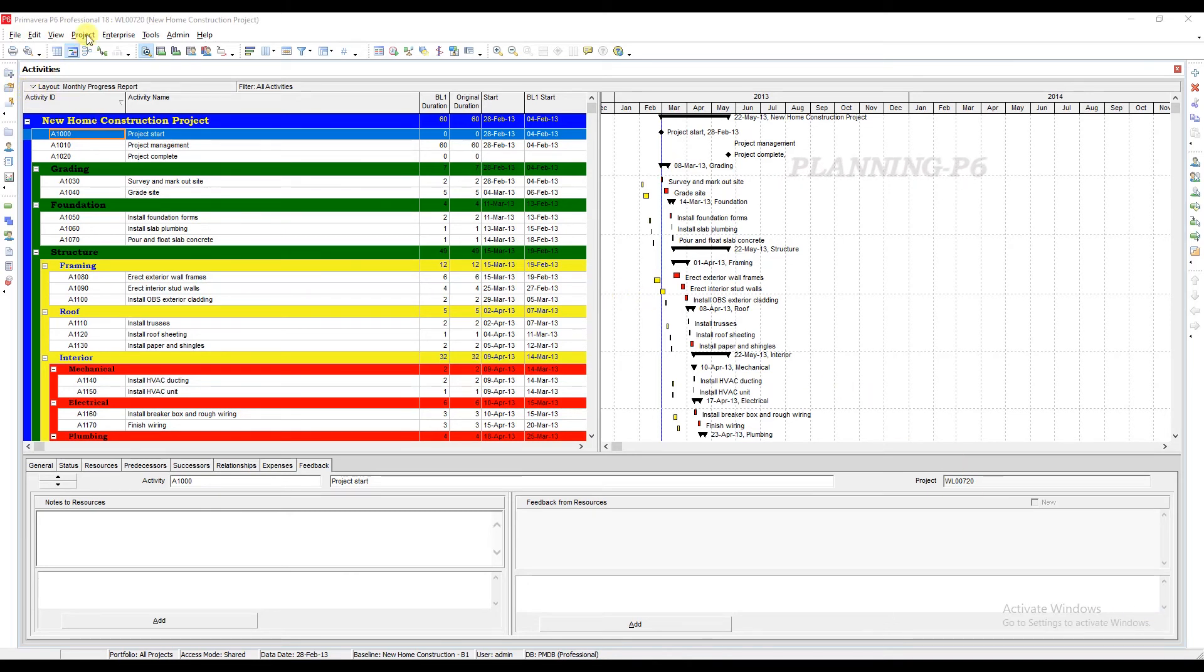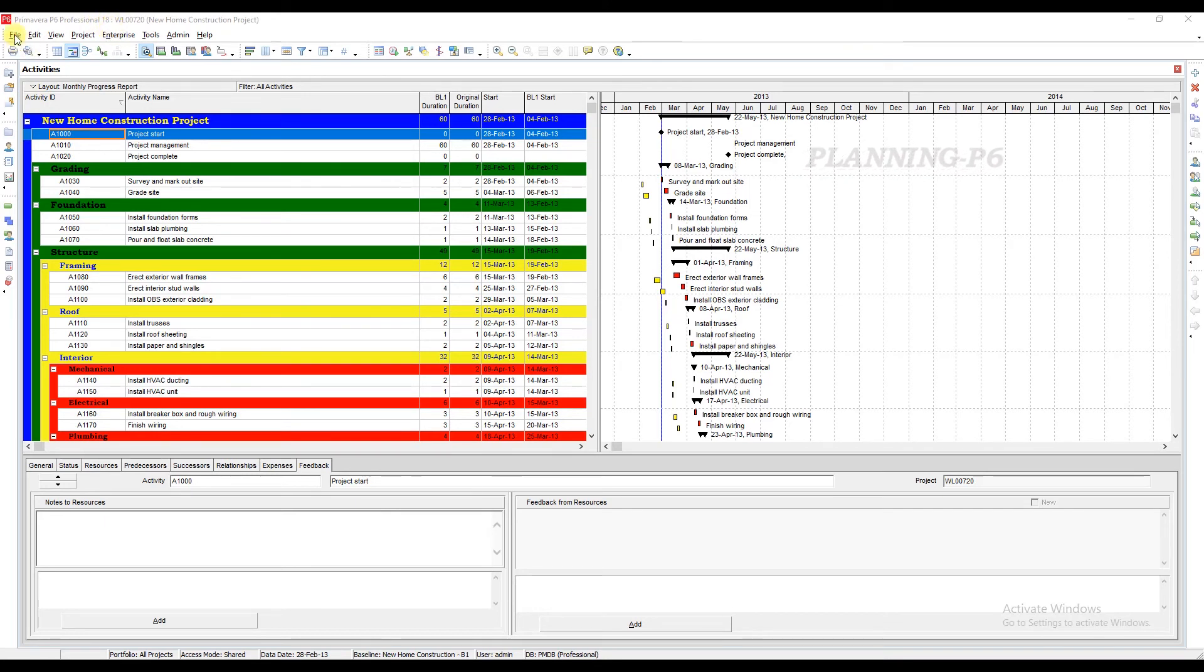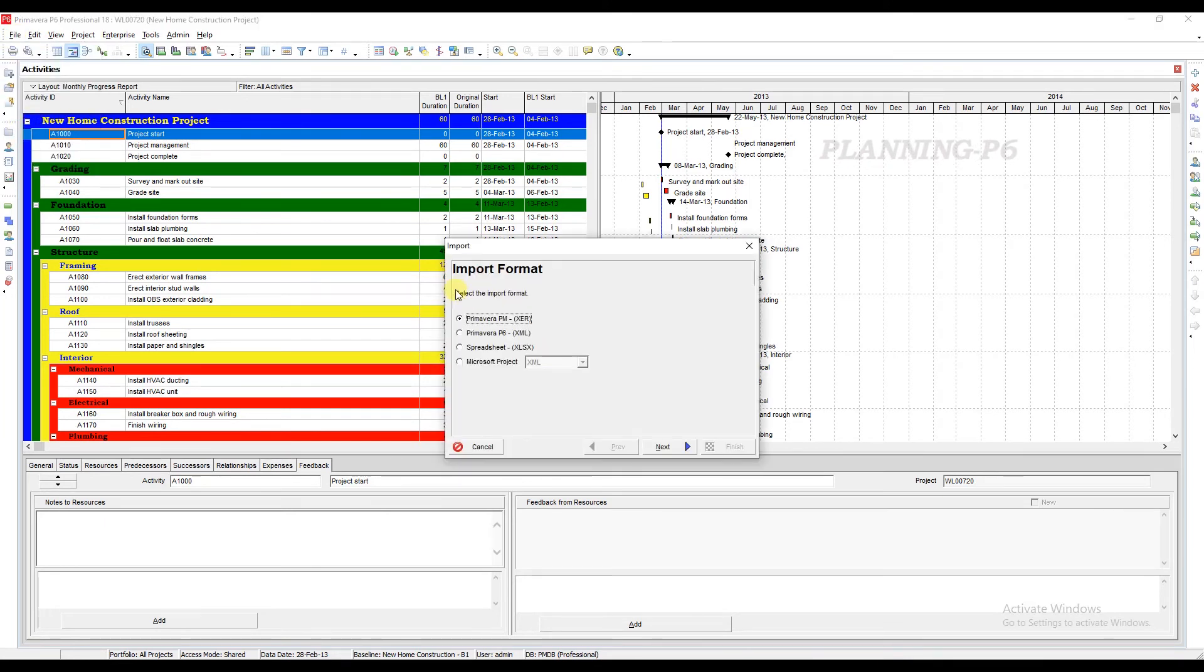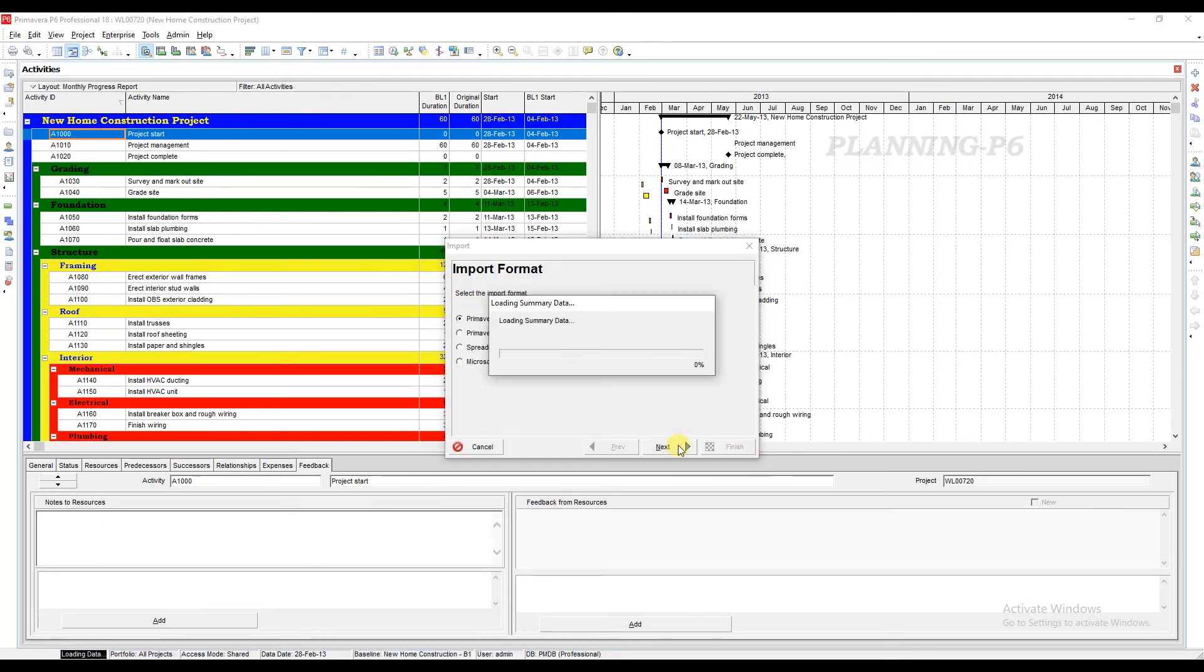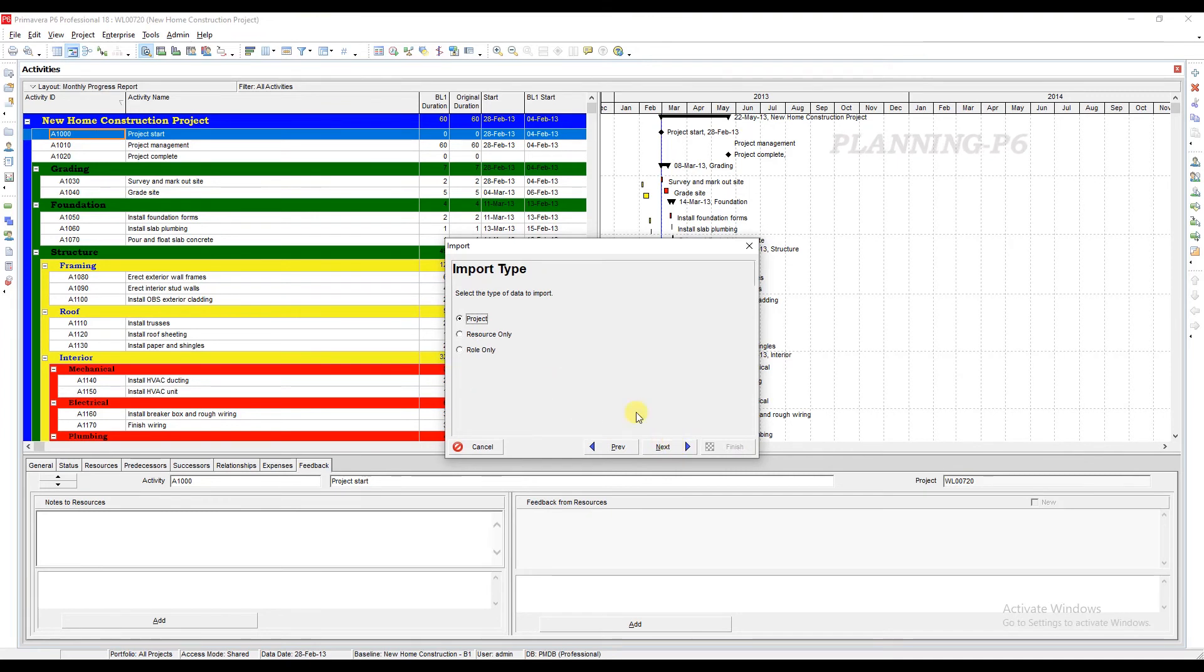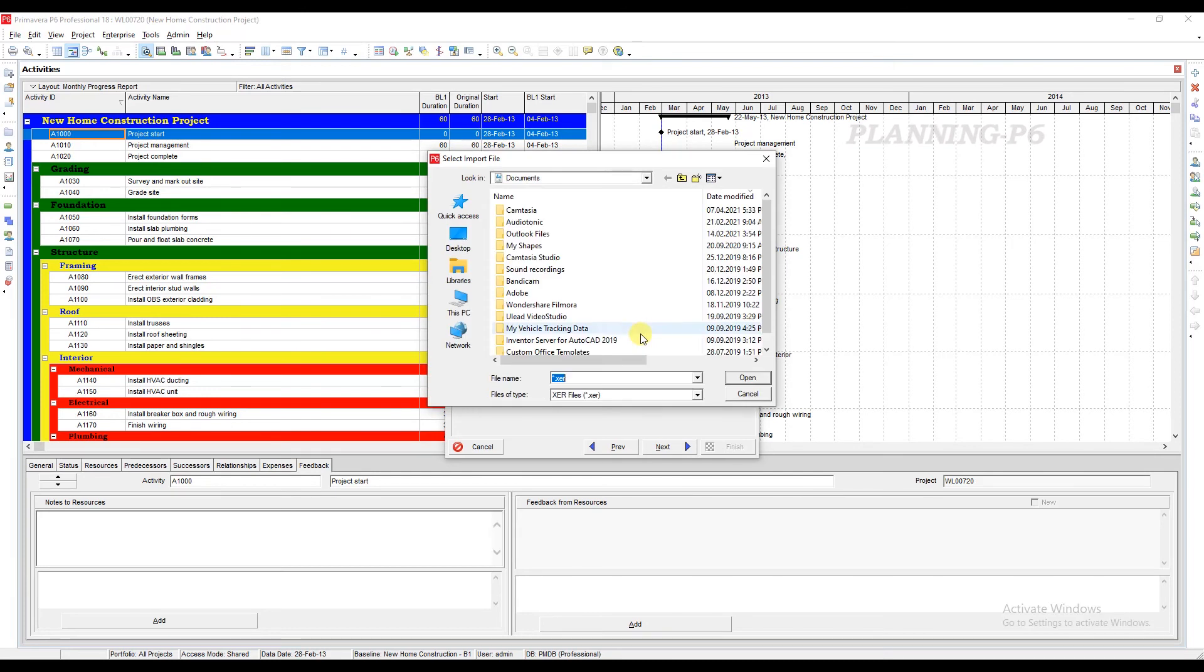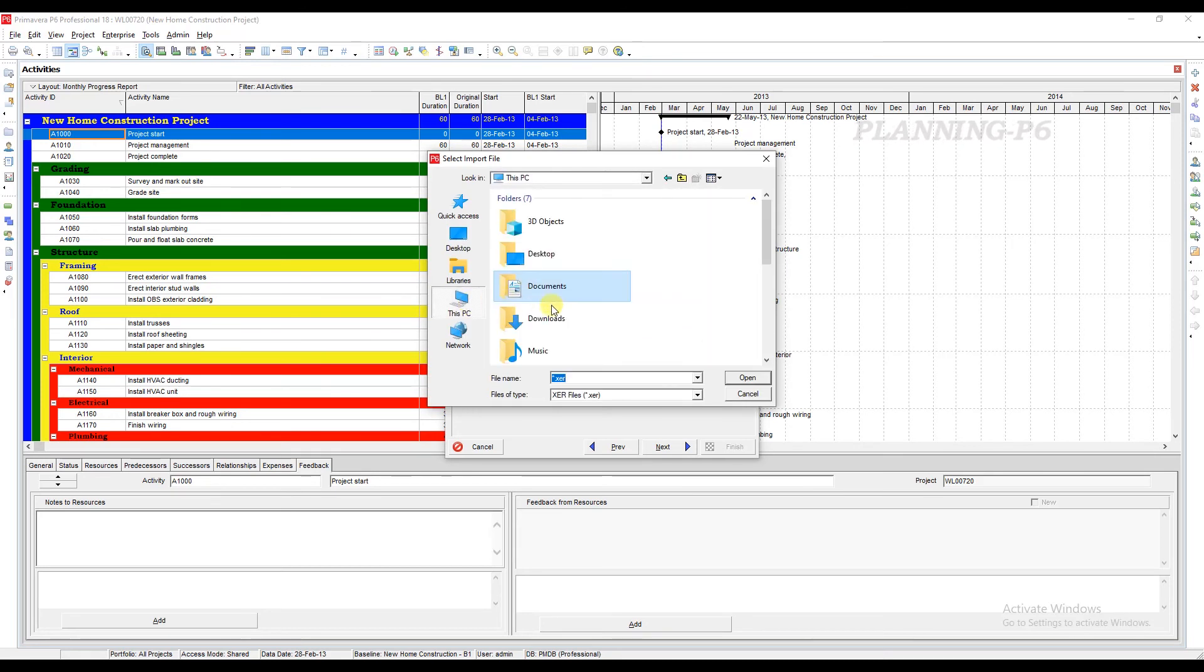Now I will import that file in my version 18.8. You can see here version 18.8. Go to File, Import, XER. Project, yes, next. Select the location from here you want to import it.